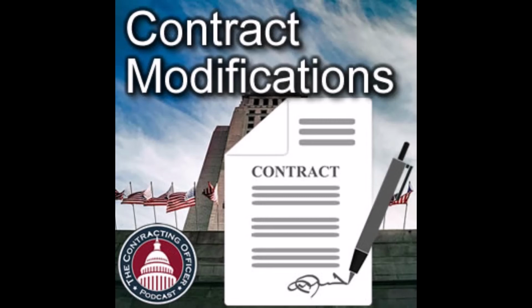For me, industry should care about modifications because you should understand that the government may view modifications as part of some evil get-well plan. And what I mean by that, you've heard of buy-in. Whenever there's a competition, the government's always worried that a contractor is going to buy in. They're going to bid an artificially low price in order to win, and then count on contract modifications to fix all the holes and deficiencies in their plan so that they can actually make money on it.